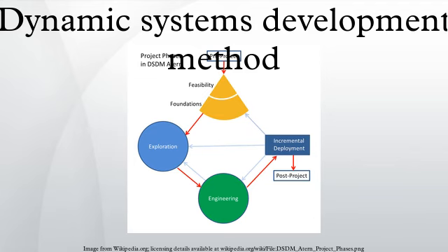A project lifecycle phase is subdivided into 5 stages: feasibility study, business study, functional model iteration, design and build iteration, and implementation. In some circumstances, there are possibilities to integrate practices from other methodologies, such as Rational Unified Process, Extreme Programming, and PRINCE2, as complements to DSDM.